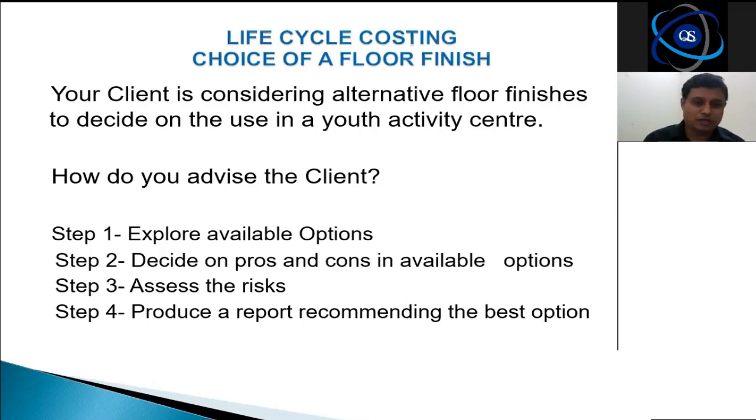Number 1, explore available options. Number 2, decide on pros and cons. That means the plus side and the minus side in available options. Then assess the risks, that you have to assess the risks by deploying any of these options. Then produce a report recommending the best option. These are the 4 simple steps involved in doing this particular exercise. And I'll tell you how you are going to do that.